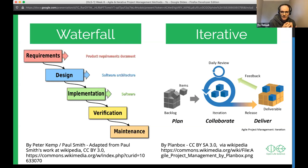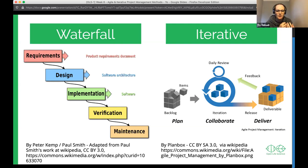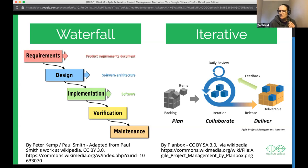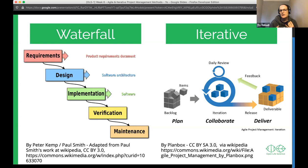Agile responds by saying we need to interact with people constantly and work in small, iterative chunks. You maintain a backlog of items, take off a small discrete chunk at a time — a day, week, or month's worth of tasks — release it, and get feedback from your community or peers. That feedback adds more items to the backlog, creating a circular cycle where releases are shorter and smaller but tend to be what people actually want.